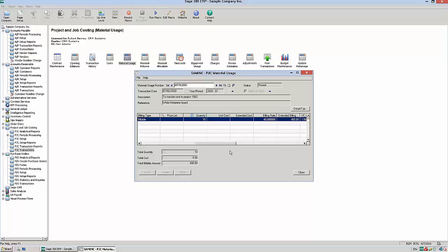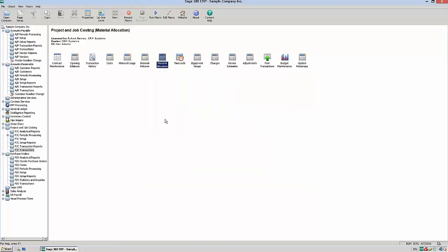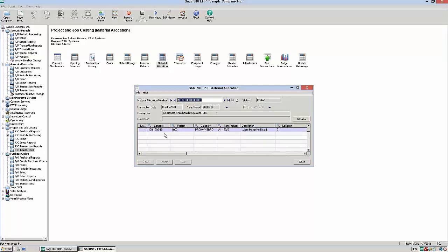Now that's something where they're consuming them. So those are going to go and they're never going to come back. Those are consumables in that particular type of example. But we can also do things such as material allocation. So if we were going to, say, take some equipment, maybe some tools, maybe the actual site office trailer, we're going to put it on site and then we're going to bring it back. We can use material allocations for that, where we can take a particular type of product. In this case, it's a whiteboard as well. This time we're going to put it out in the site office and bring it back, but it could be the site office itself. We're going to put it onto that project and we're going to have a rental fee, right, for them essentially to rent those for a temporary period of time.